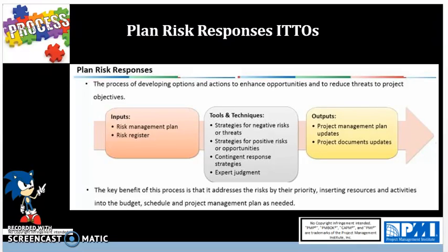Note, we will have this laid out in the contingency reserves of the cost baseline and management reserves respectively within the budget. So basically, we need to make sure that we have all of these responses in line, ready to go, and get ready to respond to these risks as they occur from all of the various facets in the project in terms of cost, schedule, procurement, stakeholders, etc.